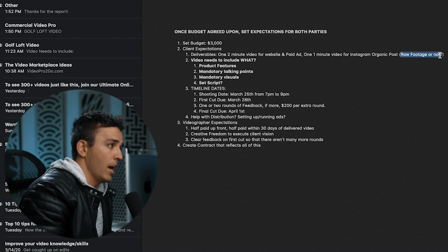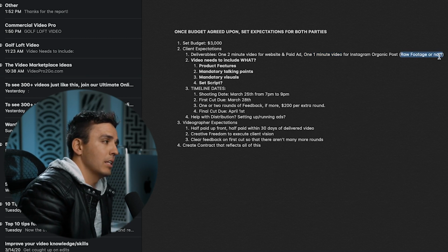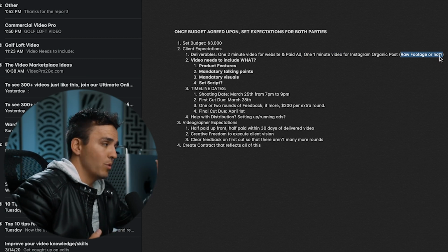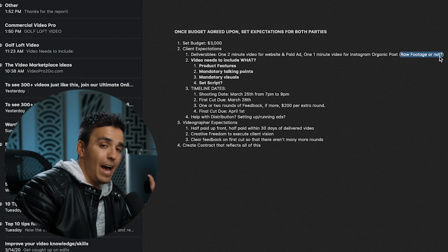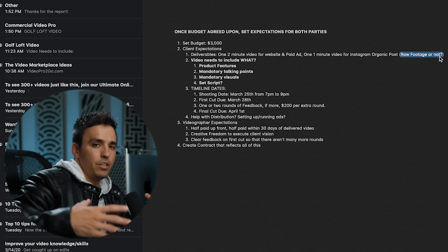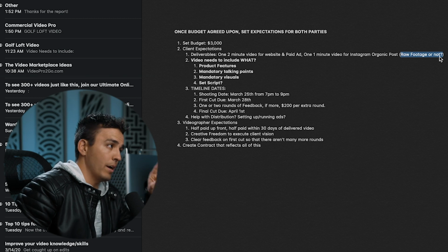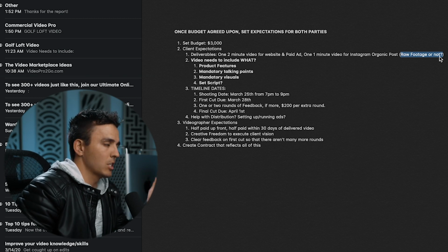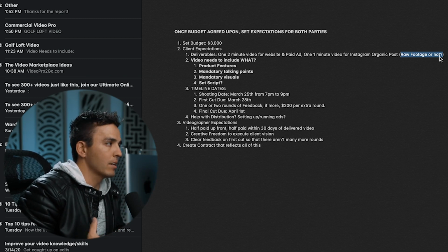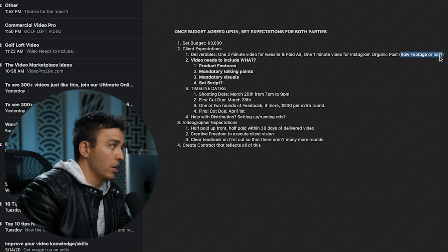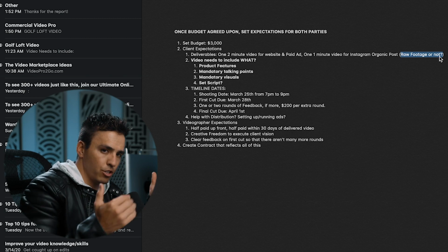Now, this is a great time to specify whether or not the client gets the raw footage. And if they didn't specify that in what they were going to need, this is a good time for you to ask because they may not know they need it until you finish the video. Then they're like, oh, by the way, can we also get the raw footage? So I'd ask this at this point when setting expectations and creating a contract. You say, all right, just so you know, you're getting a 2-minute video and a 1-minute video for $3,000. That's the exchange of goods.